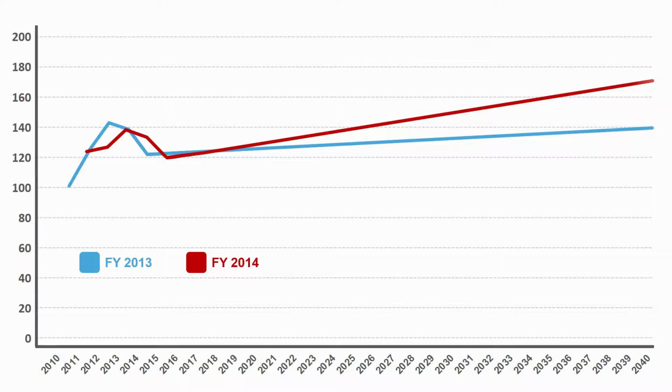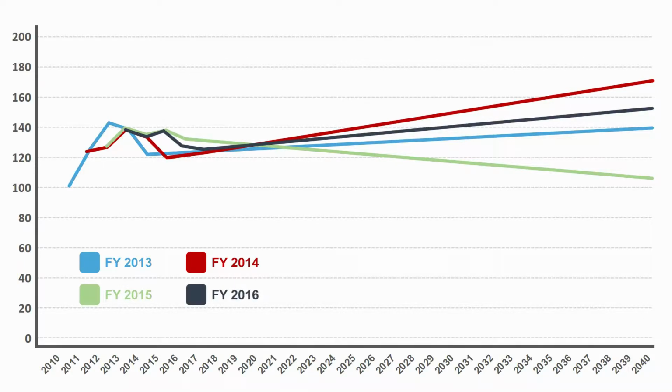If we continue this method for fiscal years 2015 and 2016, we will continue to see large swings in the forecast for the same barrel of fuel over the same time periods. For example, fiscal year 2015 had a forecasted escalation rate of negative 0.9% in the fifth and final year of guidance. Extrapolating that out to the year 2040 shows a price decrease to nearly $107 per barrel. With no other changes to program assumptions other than out-year escalation rates, we can generate major swings in cost estimates.